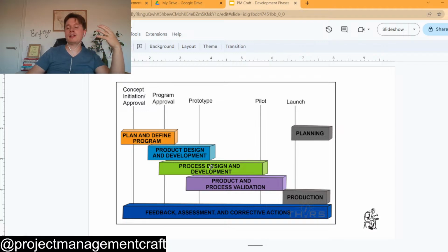And while I'm talking like that, I'm also going to add here, because I've already worked in energy construction. I worked with EPC projects, engineering, procurement, and construction. And there we also had different project phases. The first one was, of course, the engineering part, together with the planning part. That's what you would see here. Then, of course, you develop a design. Then you move again to exactly the same thing. Of course, the name of the phase will be different because there you would have procurement, where you're buying equipment, but then you also move to construction, where you have the execution.